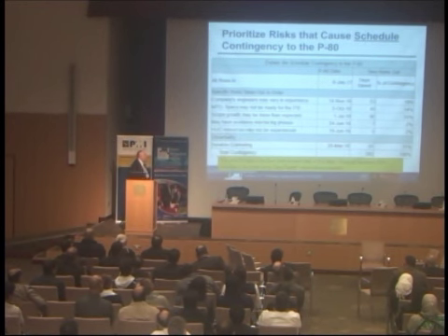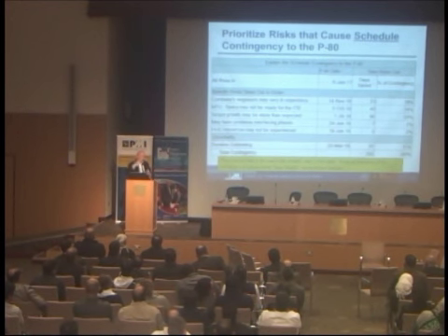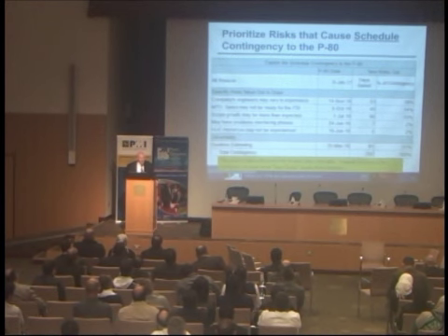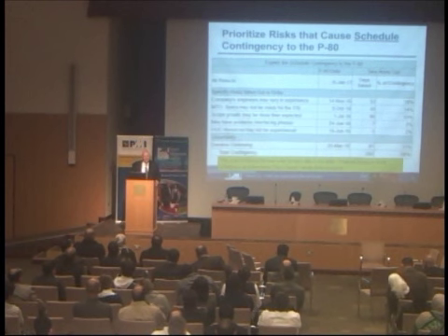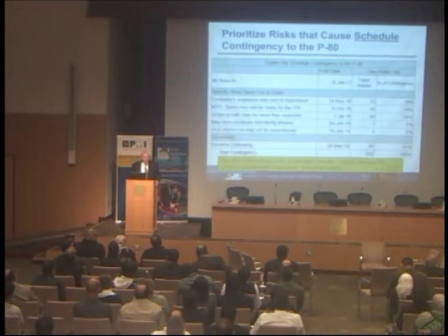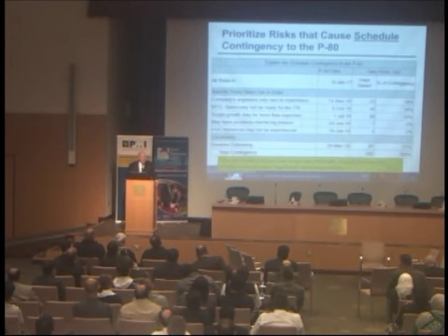Well, it turns out that there's a new risk tornado, and you use that to identify the next 4 or 5, and you try them out one at a time with the first risk already taken care of. That is, the first risk is with 0 probability. It's no longer being considered. What does that do? Taking a risk out, finding a risk is probably like finding the thing that is mostly affecting the risk-critical path. But if you zero that out, that may not be the risk-critical path anymore. And in fact, you may find that it exposes a different path.